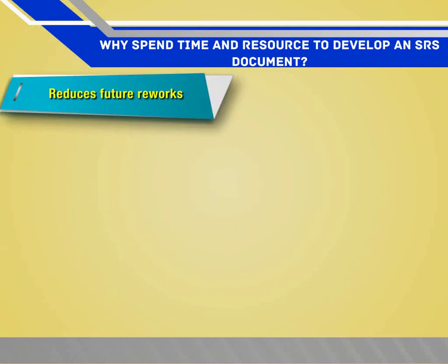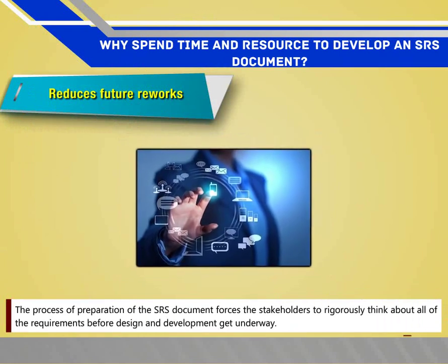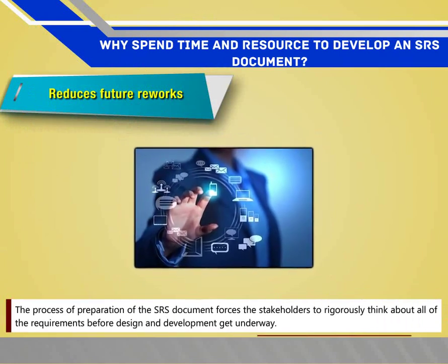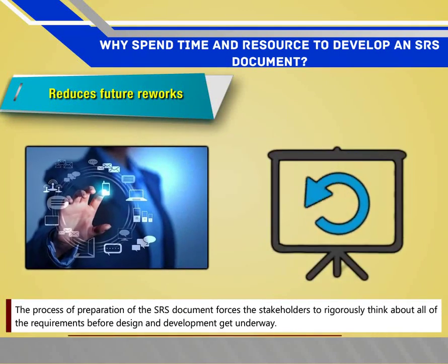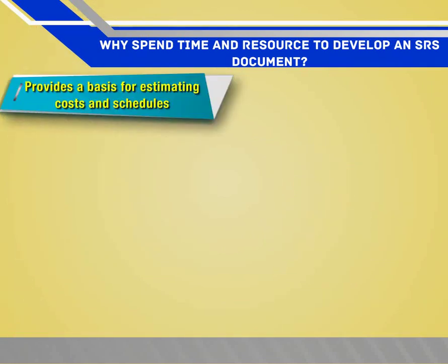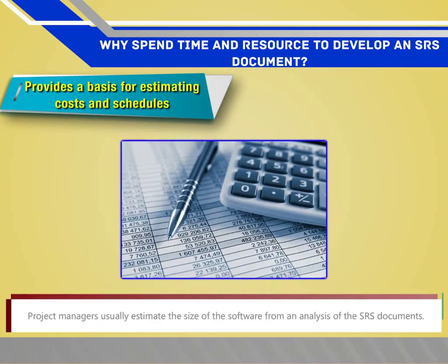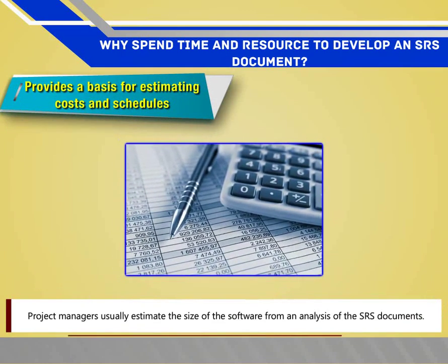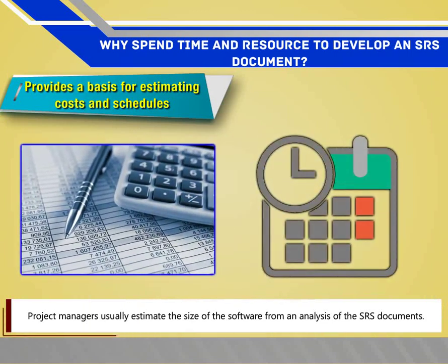Reduces future reworks. The process of preparation of the SRS document forces the stakeholders to rigorously think about all of the requirements before design and development get underway. Provides a basis for estimating costs and schedules. Project managers usually estimate the size of the software from an analysis of the SRS document.